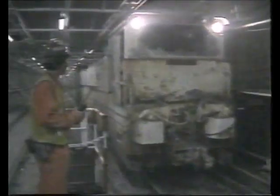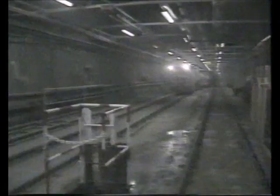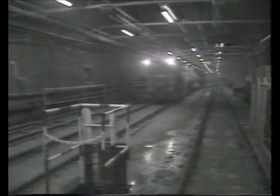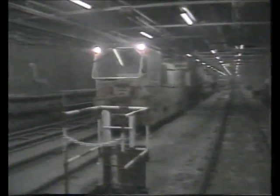At its peak, the narrow gauge railway consisted of some 200 kilometres of track. It has been calculated that over 7 million tonnes of materials were brought into the tunnels, and some 10 million tonnes of chalk marl excavated by the TBMs was brought out. There were 160 locomotives and about 1,000 items of rolling stock. This working is conveying wet concrete in a bullet wagon, so called because of its shape.